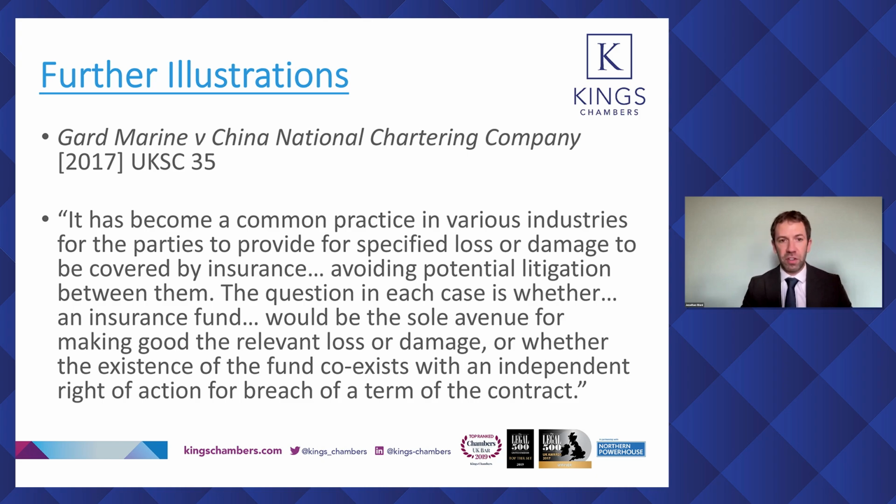For damage either to existing structures or the works. So the Guard Marine case essentially confirmed the position in CRS that we've seen, but generally speaking, parties to a joint names policy don't have a liability to one another in respect of a matter for which they are both insured. There's an interesting discussion of the basis and some of the further consequences of that proposition, particularly as regards